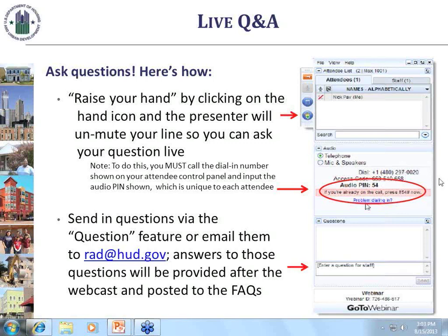Yeah, another written question. If we have an application for a property that is currently designated elderly, which we would plan to demo and construct new units, would there be any requirement that the replacement units also be elderly? No. There is no requirement under RAD for you to replicate the bedroom distribution or the designation that exists for the property. That's up to you, but also be aware that all RAD projects go through an FHEO review process. So FHEO sometimes can have concerns if a community is simply dumping family units in exchange for senior units,